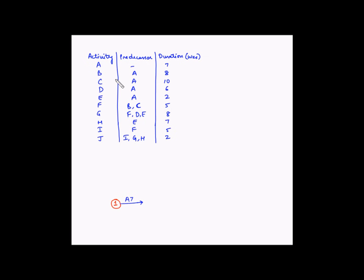Activities B, C, D, and E depend on the completion of activity A. So let us draw the ending event for activity A and the starting event for B, C, D, and E. Let us give this the number 2.